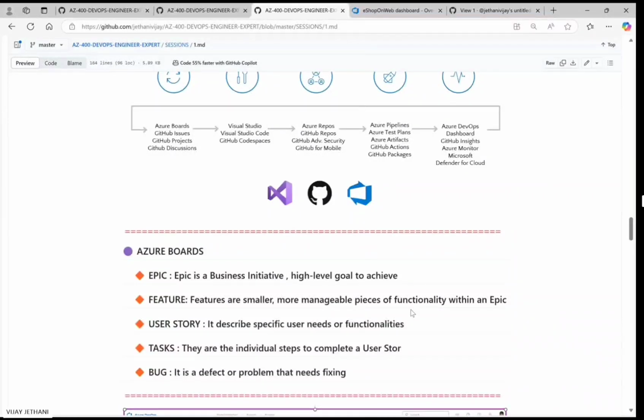Obviously I have to break down that website into the front end versus the back end versus something on the database side, and divide the functionality accordingly and give it to a team capable of delivering it. Or I would say breaking down the modules so that parallel or agile work can be carried out. That is what a feature is.